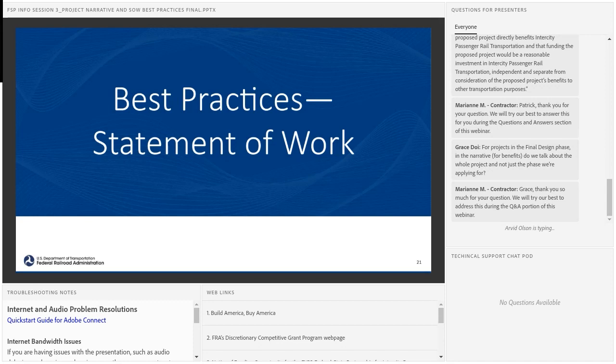I am a grants manager for FRA, and I'm going to spend a few minutes talking about the statement of work that FRA requires be submitted with all of our grant applications. A couple things before I start. When I say statement of work, I kind of mean the 4 attachments that together with attachment 1, which is our standard terms and conditions, comprise the notice of grant award. That is the scope of work, the schedule, the budget, and the performance measures.